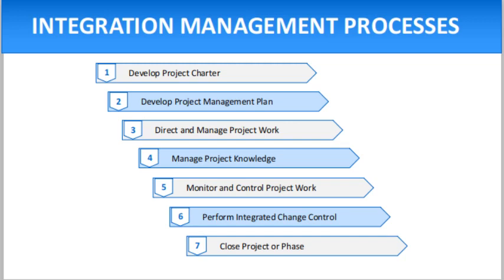Close project or phase. After all project work is completed and deliverables are shipped and approved by the client, it's time to close the project. Project closure involves holding a final stakeholder meeting, conducting a final review of the project, closing the contract, and organizing and archiving project materials for future use. Project closure serves as a reference for future endeavors and provides insights on how to improve the project integration management system.